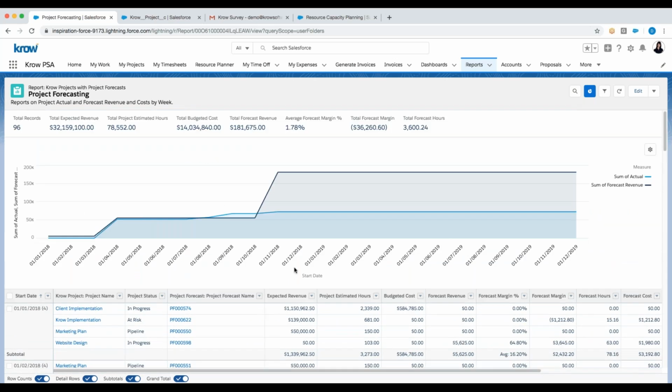The system actually takes into consideration billing types. So as an example, if it's time and expense, we can forecast what the revenue is going to be based on the schedule of resources against those projects and/or tasks. We know what their bill rates are, what their scheduled hours are, and we can forecast that time and expense. If you have a retainer project, we can forecast what the retainers are. If you have milestone payments, we forecast when those milestone payments are becoming due, and we can forecast that revenue as well. So it takes into consideration all of the billing types within your particular projects.